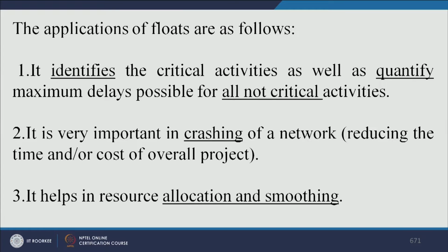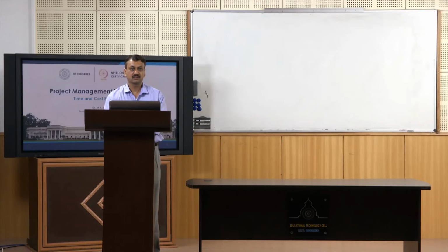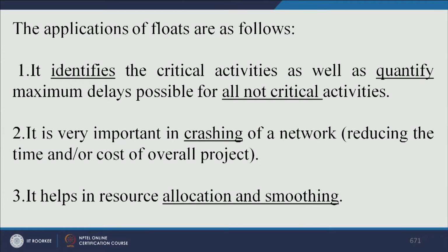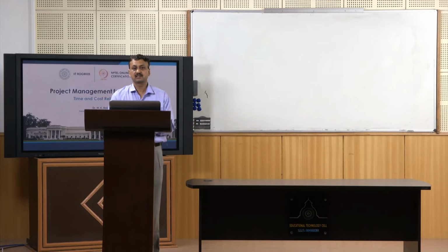So we will take help of free float when we crash a particular project. And floats are also useful in resource allocation and resource smoothing, again because you can delay some of the activities in a project, because you have got certain limited resources. So it will help in resource allocation and smoothing also, right.